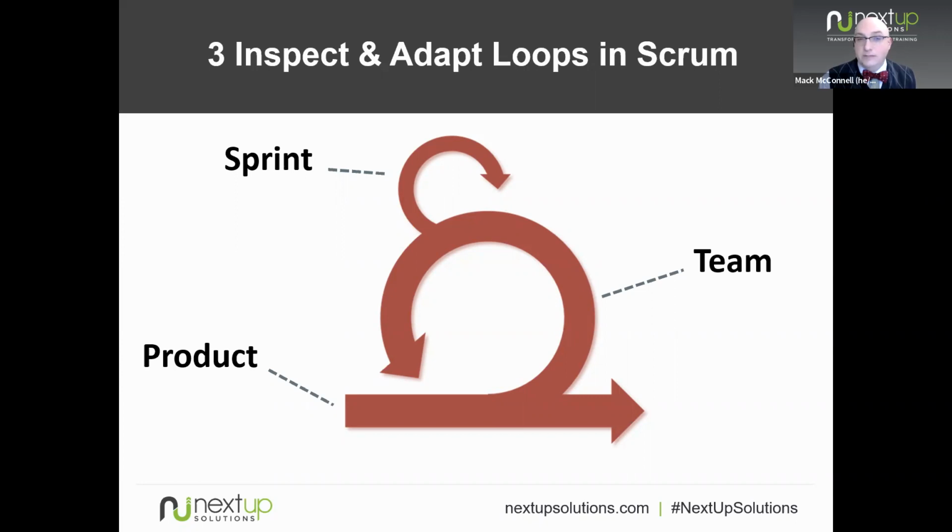So for example, if we're doing 2-week sprints, we might get to the end of a 2-week sprint and take a look at the new bits of product that we built and realize, oh, that's not actually good. That's not what people wanted. That doesn't meet the need. Let's get rid of those things. Well, that means we only went in the wrong direction for a sprint's worth of time, which for that team was 2 weeks. So that's pretty good. I like that. That mitigates risk because we're chopping risk up into smaller pieces. And that means we get more freedom to experiment and try stuff because we can only go in the wrong direction for so long.